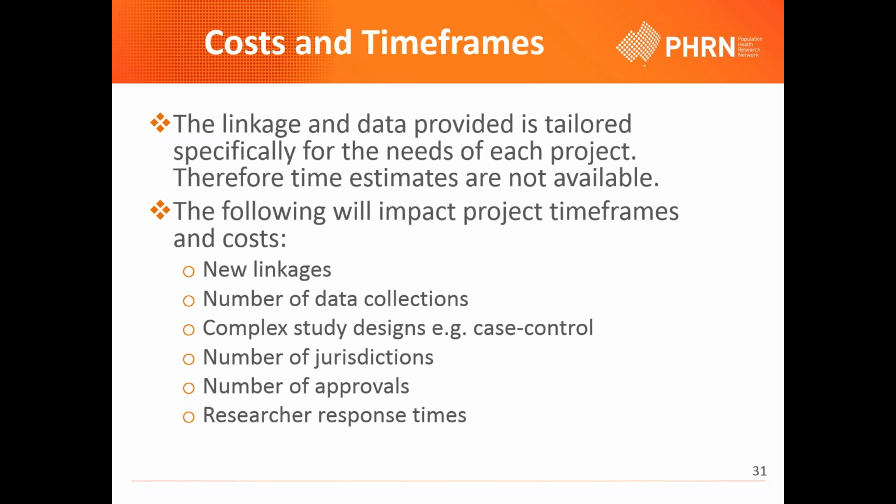If you've got the same number of participants, so less than 900,000, and you want to link to the MBS or PBS, the AHW suggests it could cost between $21,000 to $25,000 excluding GST. And there's also charges associated with storing and accessing your data through the SHORE, which is the Remote Access Laboratory, and it also does cost, I think, $600 to lodge an ethics application to the AHW Ethics Committee.